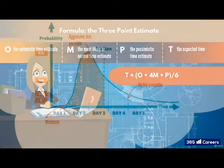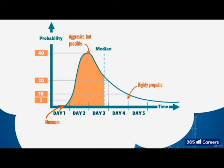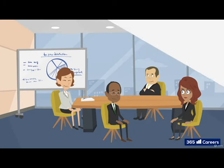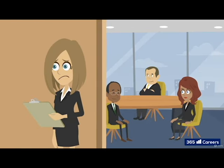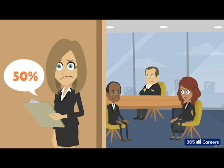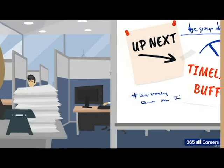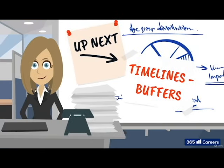Although the average is a good point to put an estimate, if you think about it, there is a 50% chance of finishing before our estimate and 50% chance of going beyond it. So, would you feel comfortable presenting a project schedule and saying to the team in the kickoff meeting, we have about 50% chance of succeeding with the plan I have created? Probably not. So, that's where the next lesson comes in, where we will be talking about buffers.